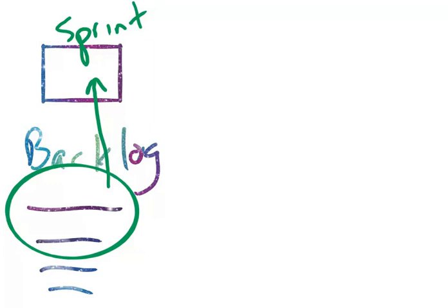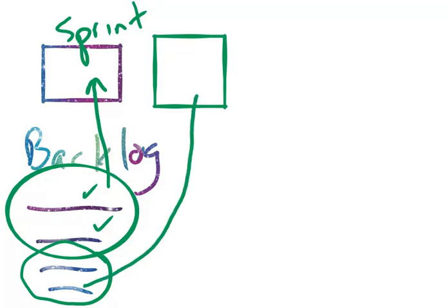2 weeks time, 10 business days essentially. And within those 2 weeks, we complete specific activities or functions that we're trying to get. At the end of it, we review the outcome with the management. If they're happy with the outcome, they give us the go-ahead to start with the next phase or next sprint of that project. In the next sprint, we select from the remaining backlog additional features that will need to be completed in the next 2 weeks.